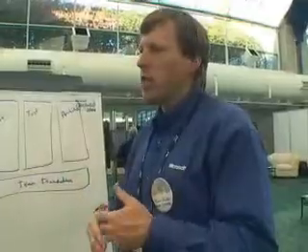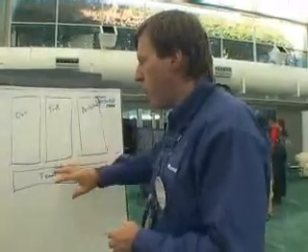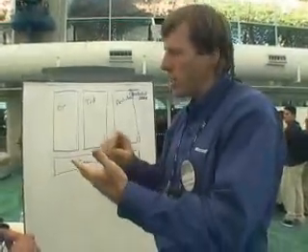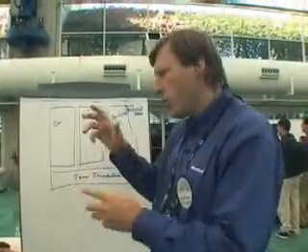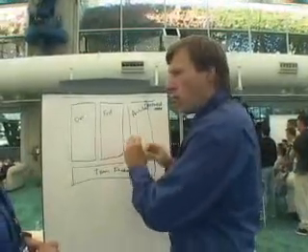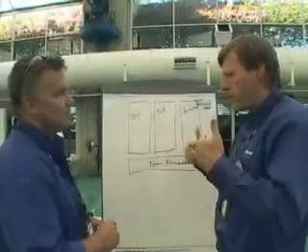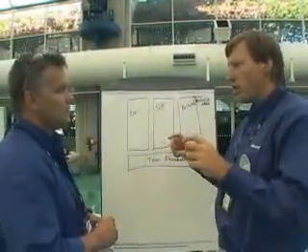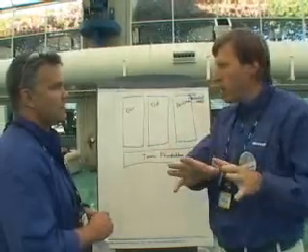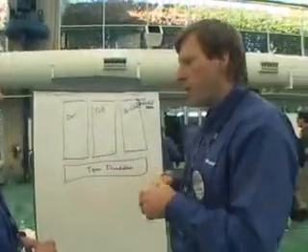What they want to do is they want to manage their project with Microsoft Project and Excel and Word and those kinds of tools. So we've built integration, as an example, from our work item tracking system into Project and Excel. Your project manager can take Project, schedule the project, assign who the work items are for, do balancing, and do all the cool things that Project allows you to do. They can then export all the tasks out of Project into the work item tracking system, and those work items will now show up in your developer's Visual Studio. When the developer runs Visual Studio, they open the solution, they'll see a list of all the work items that have been assigned to them. As they work on those work items, they update them, they make progress. That information can be re-imported into Project, update your project plan, and everybody gets to continue to use the tools that they've always used.